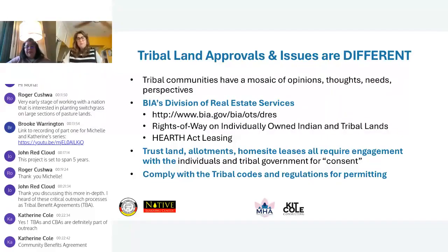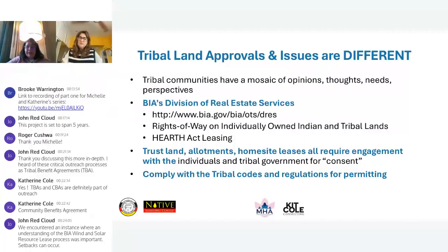And I have put in this particular slide, if you're not that knowledgeable about that, it's important in terms of keeping your project on scope and on timing, because some of the processes for approval for land consent, meaning going on the land, getting the authorization from the federal agency, the Bureau of Indian Affairs, or the tribal council, take time, and you need to incorporate that.